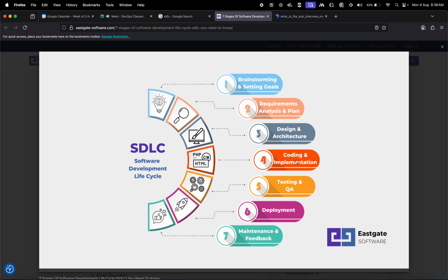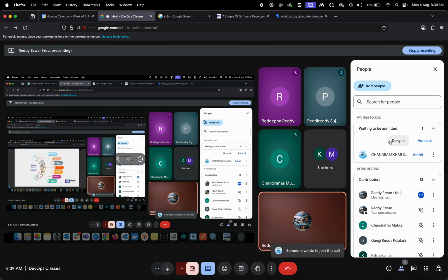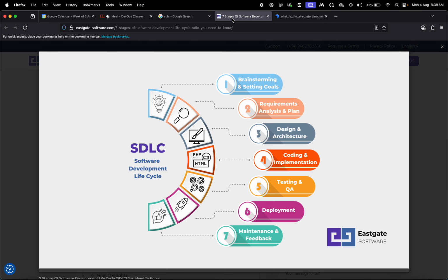So what we'll do, Agile means, today we discussed it, we will have a meeting. Okay, what is our Agile cycle period? As I told you, small time cycles: 1 month, 2 months, or sometimes 2 weeks. 1 week also we have cycles now, but it's fine. So let's say we decide the cycle is one month for us. So within 1 month, what can we develop? Login page, login button, OTP validation, something. As an example, I'm just saying, username login, something like that. Within 1 month, we are able to do all these things, and we can release it within 1 month.